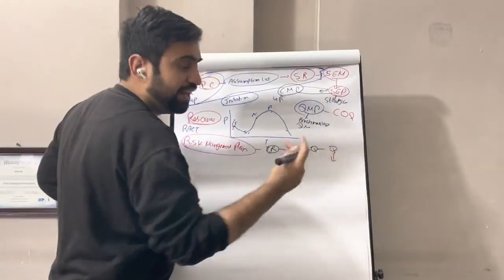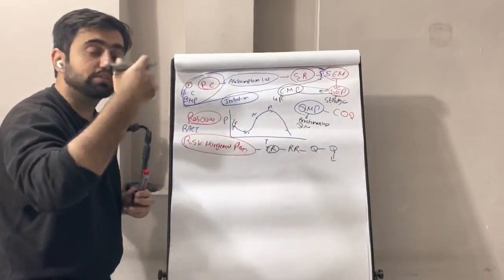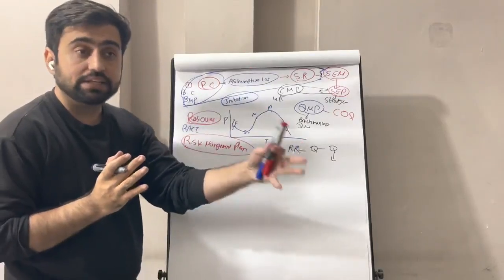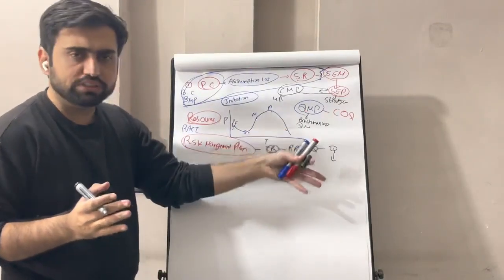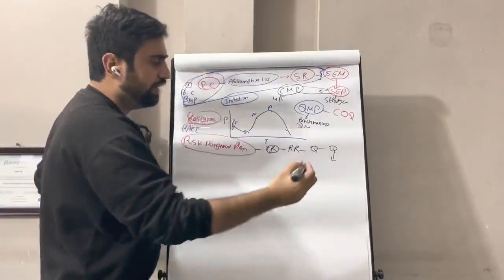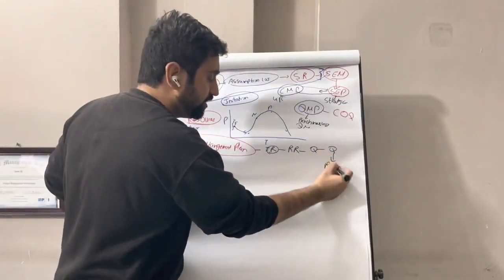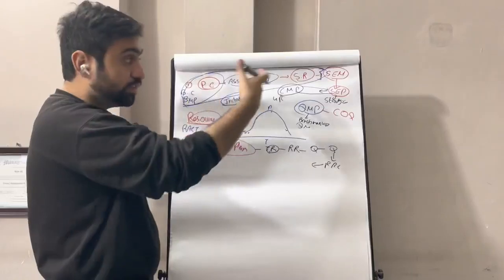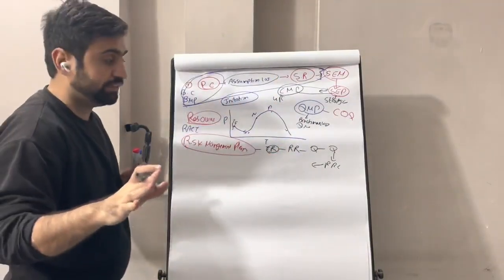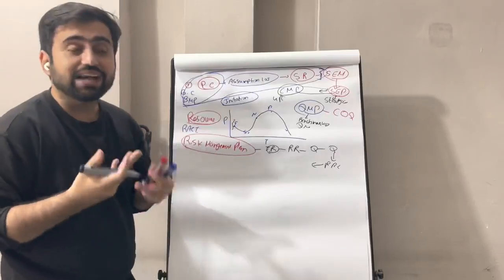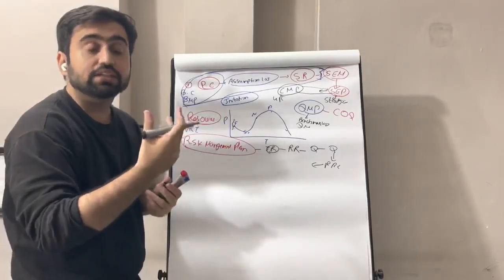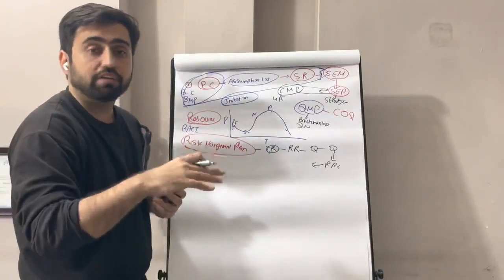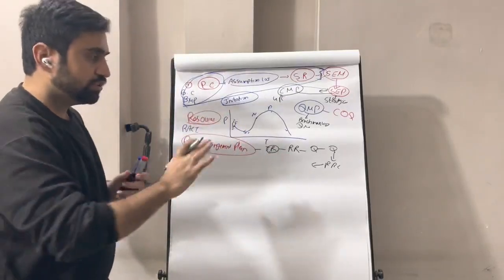And then we plan risk response. What are the responses for each risk? How are you going to tackle this particular risk in a particular fashion? So we plan risk response for both positive and negative risks. Once we make the plan risk response, it actually updates all the plans, even the scope, schedule and cost plans, which we'll make later. It updates all the plans because as a result you need to put in a contingency reserve, the reserve for identified risks, and then a management reserve, the reserve for unidentified risks. So everything needs to be put in here. So the risk management plan is made.